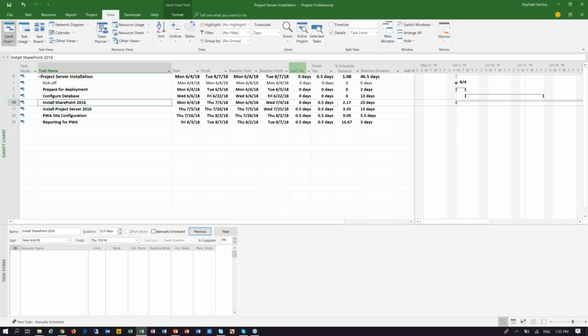And if we see the percentage of finish variance to the entire schedule is 1.8, because originally our baseline duration for the schedule was 46 days, and we are with a variance of 0.5 days, which gives us 1.08 percentage of variance. So that's a very nice and simple way for us to discover that. And this is a very useful tool. This is a very useful way for us to understand what's the size of our finish variance.